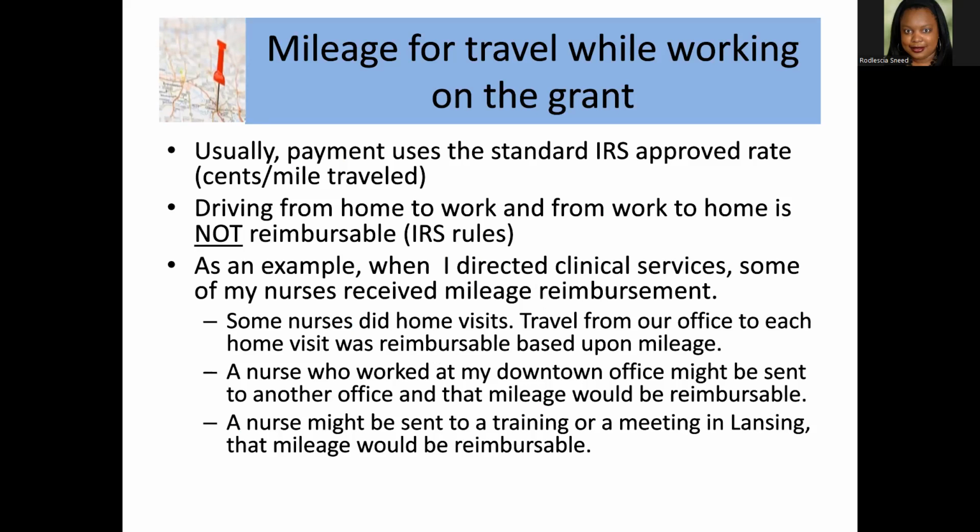The rules specify, though, that driving from your home to work and from work to your home is not a reimbursable expense. So again, it's mileage while on the job. So a nurse who worked at my downtown office, for example, so that's her normal work location, I might have to send her to another office, like our Burton Clinic, where we did our immunizations.